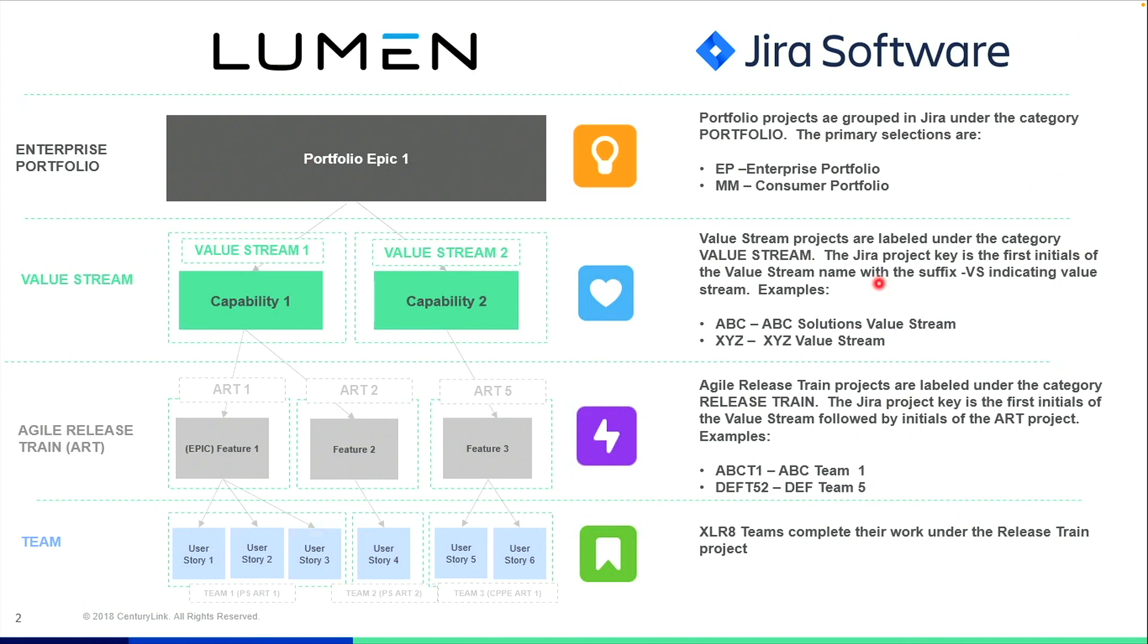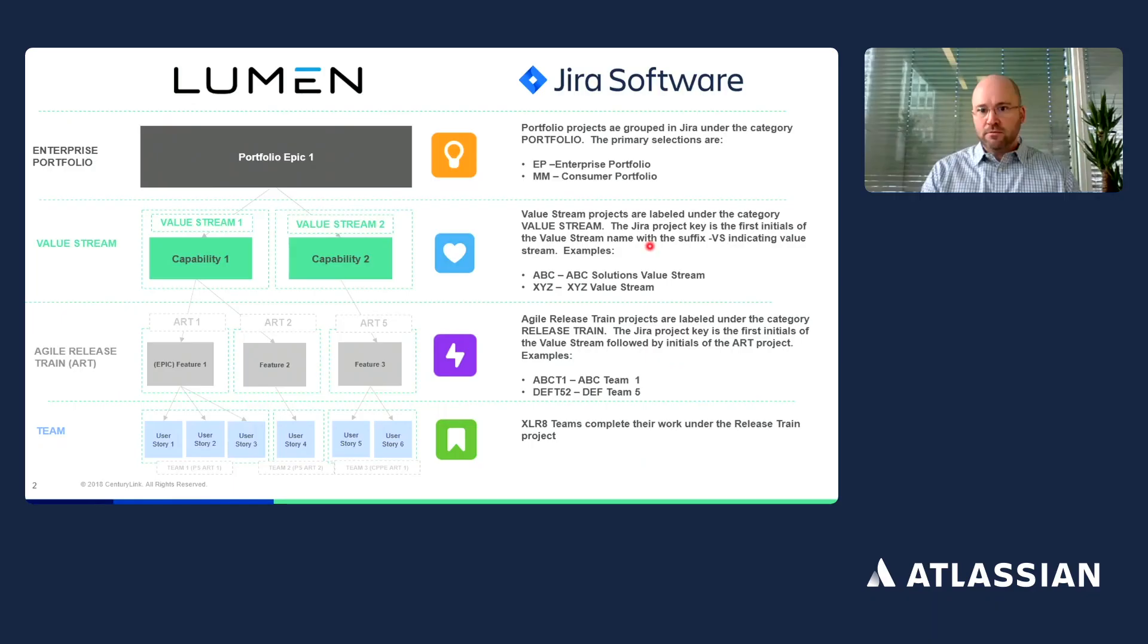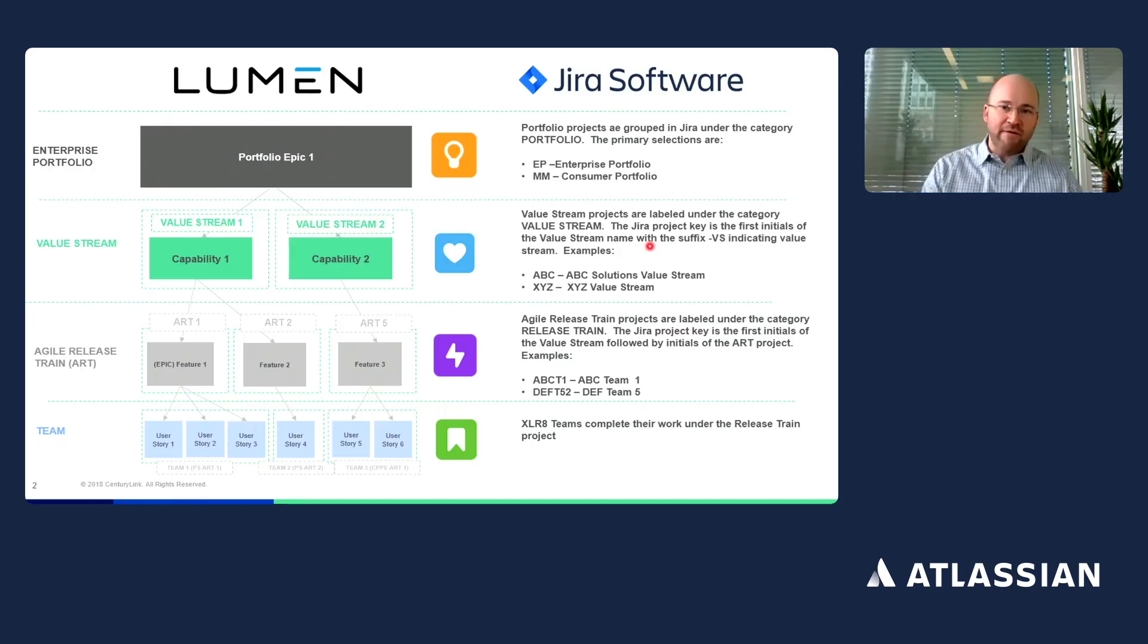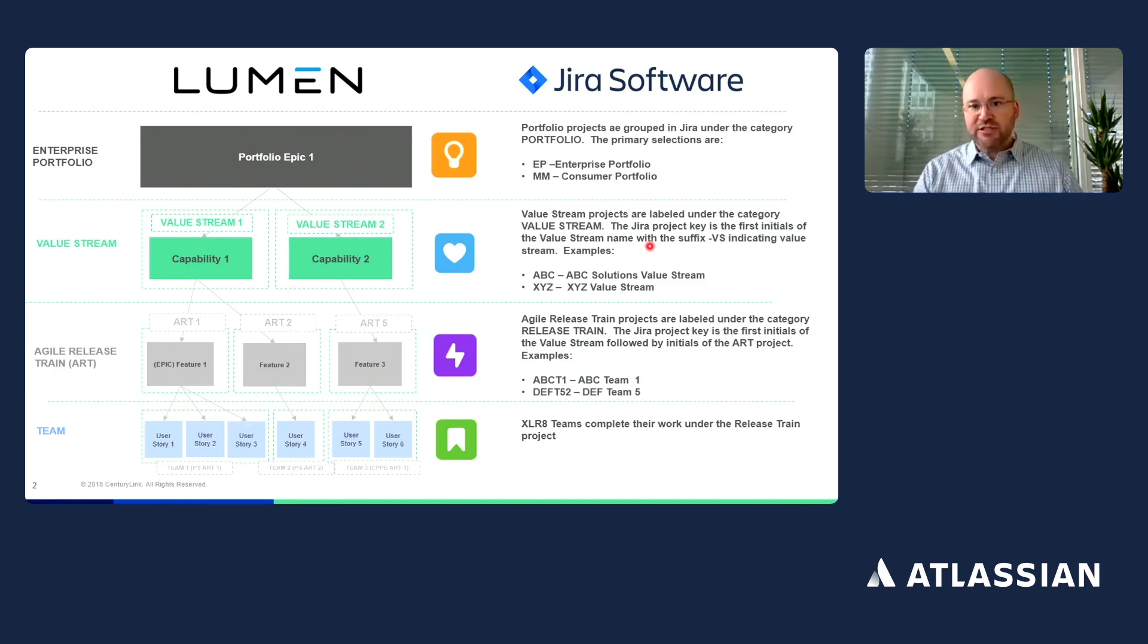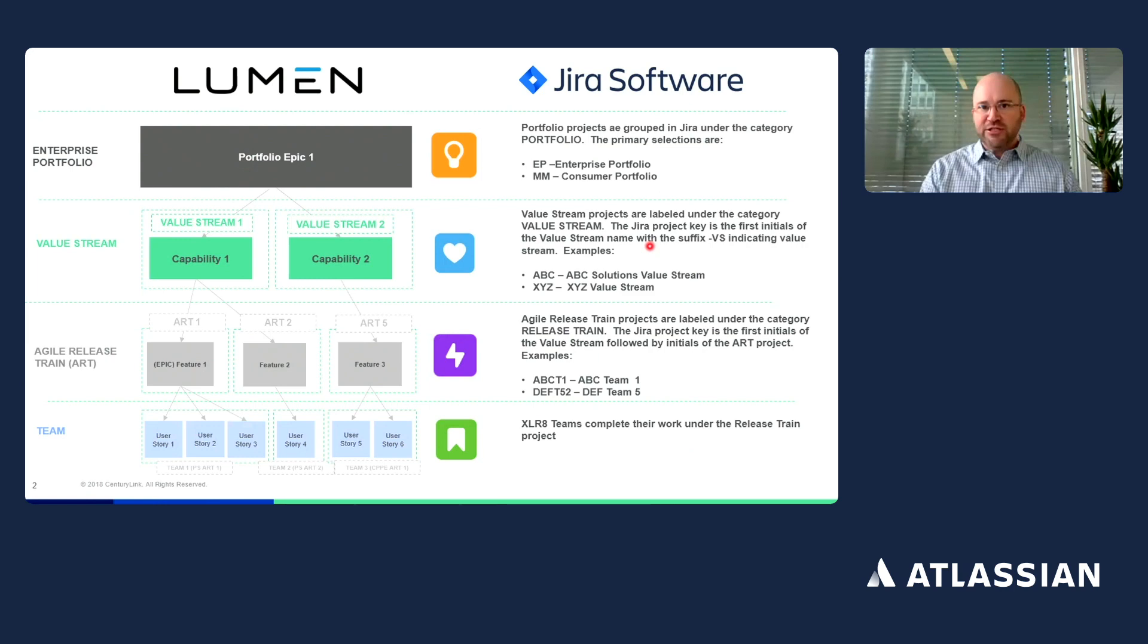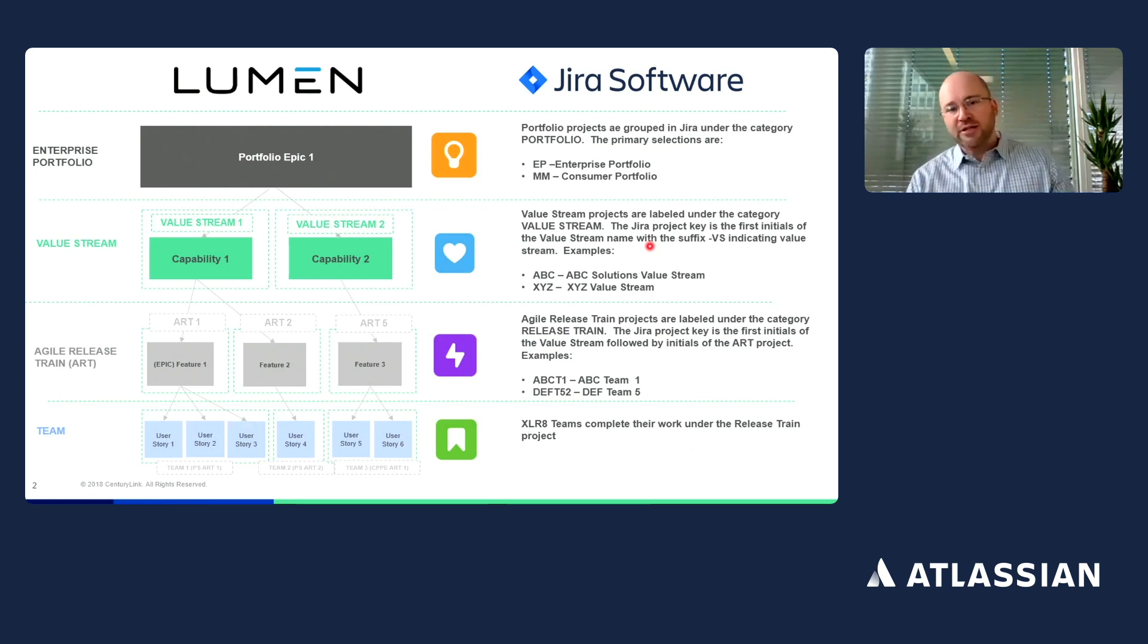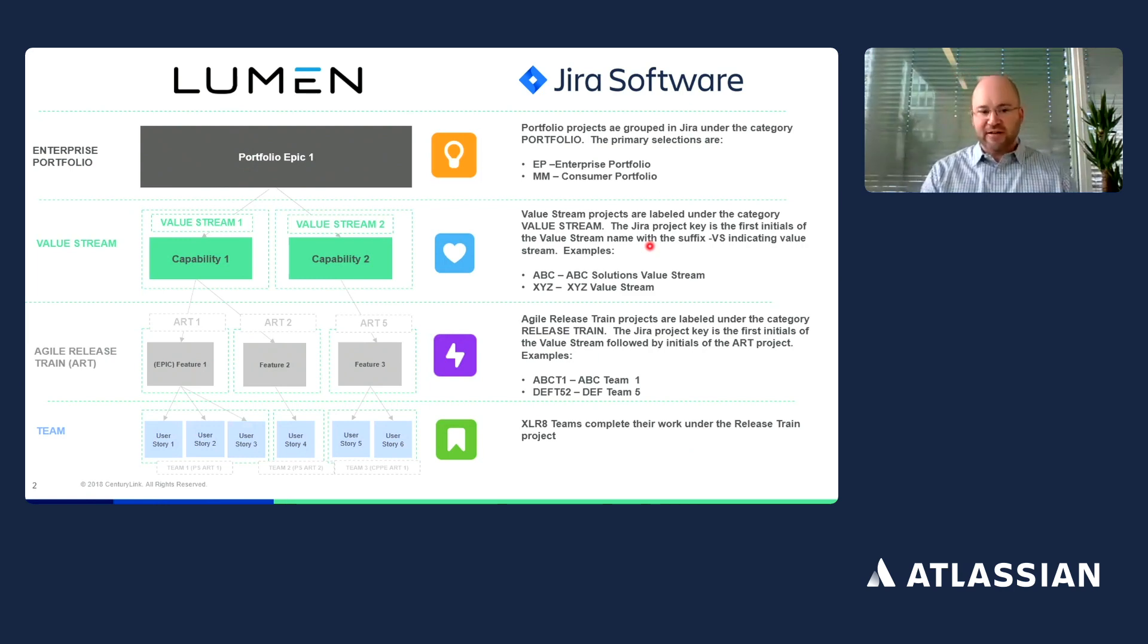Features are an issue type that would be planned and delivered over a 90-day period. The release trains take on the naming convention of their parent. So you will have the naming convention of the value stream abbreviations, then with the agile release train as the suffix.